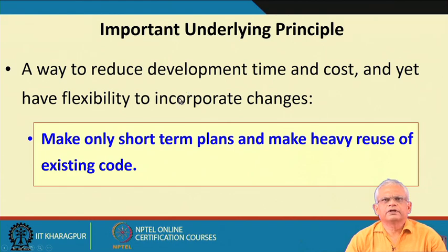It can incorporate changes flexibly, because only short term plans are made. Any change does not require changing all the plans, that is the design, the project management plan, the test plan and so on.